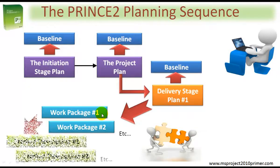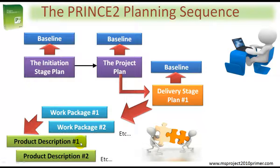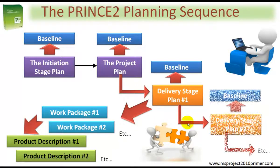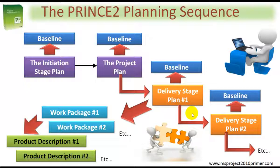Each work package in turn contains at least one product description, although it's normally the case that there will be more than one product being created within each work package. You may well have other delivery stages. The minimum for a PRINCE2 project is the initiation stage plus one delivery stage. Whether it's a simple single delivery stage or multiple delivery stages, you can plug my Microsoft Project PRINCE2 modules straight in.